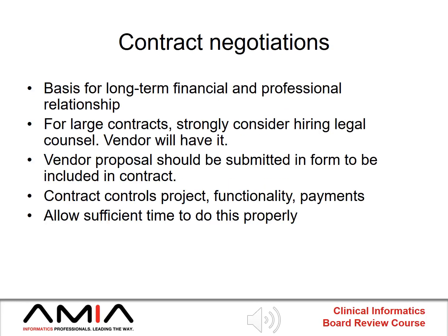Contract negotiations are very important because they are the basis for a long-term relationship with your vendor. Because they are so important, it is very much worth considering having legal counsel on your side during these negotiations. You can bet that the vendor will have legal counsel on their side. A lot of organizations include the vendor's proposal in response to your RFP in full as part of this contract, so that things that they said that they are able to do are now contractually included in your agreement.